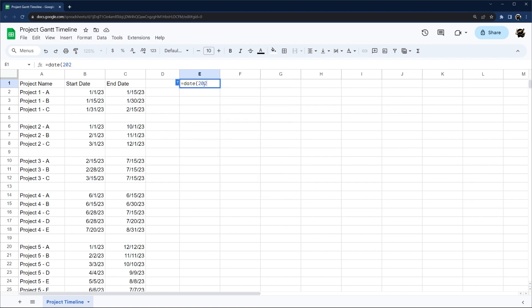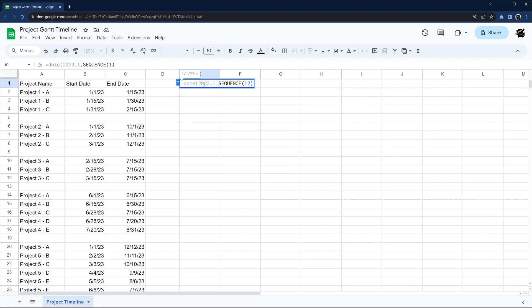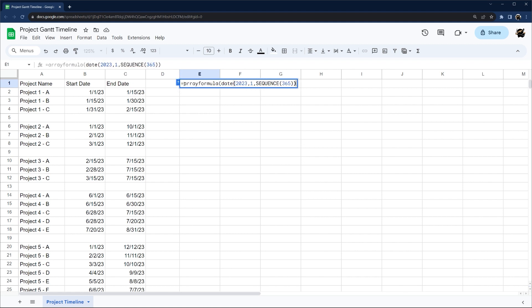I'm going to do this one step at a time. I'll start with the year, month, and then the day, but I need this to extrapolate for the year. I'm going to use a formula called SEQUENCE, which gives me a sequence of 365 numbers for a year. Using ARRAYFORMULA will allow that to populate, but it goes down — so I'm going to use TRANSPOSE to go across the top.